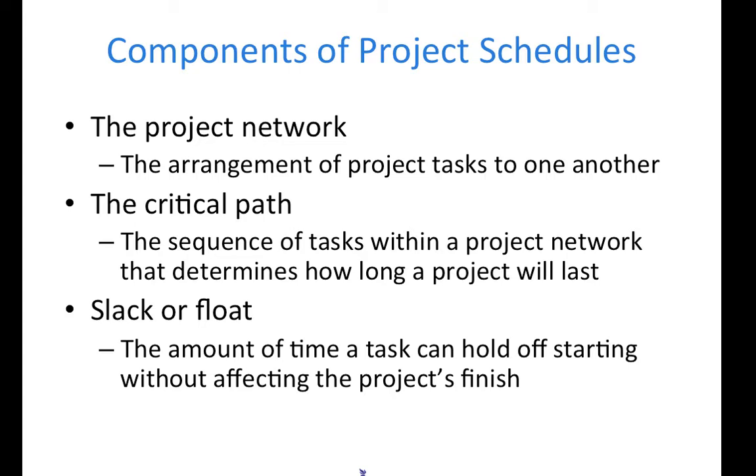Slack is the amount of time a task can hold off starting without affecting the project's finish. This is shown in the Gantt chart near the end as a line connecting activity or task bars. The longer the line, the more the slack.